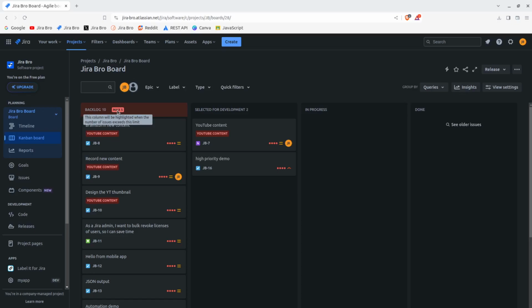you create an issue, and then what happens is that the issue is not visible, and that issue is not visible because you haven't started your sprint yet. When you start your sprint, these issues start to get visible, and you can add issues to that sprint, which actually is not really recommended because you're creating a scope creep in here, which is something that you do not want to have. You do this only if it's really, really necessary.